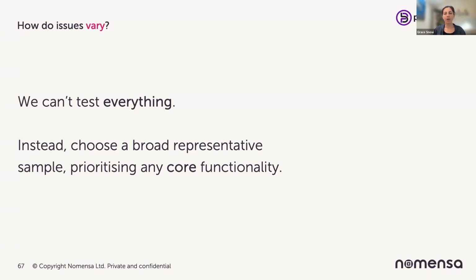Generally, a good guide is to think most components are going to take me an hour to test and to write up findings. Some components, if they're really complex and there's loads of changes going on, you might need to break down further. Others, they might be really small and they actually will only take 15 minutes to test. So you want a nice spread of complex and simple components, but you just want to get a representative sample and know that you're not going to cover everything.